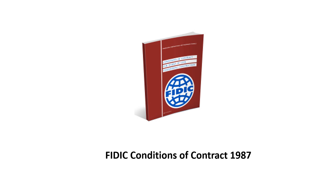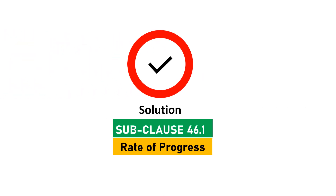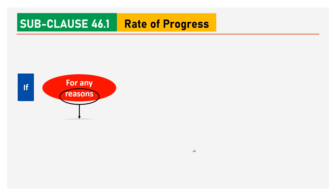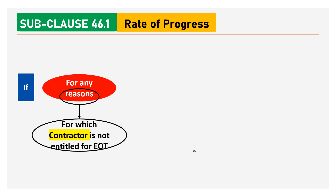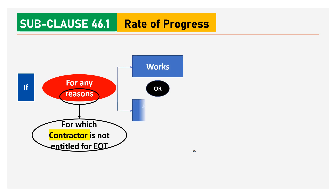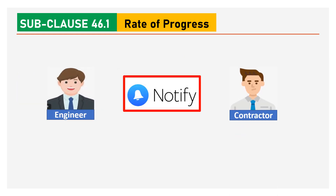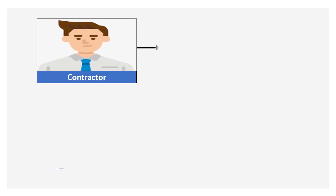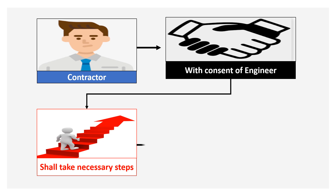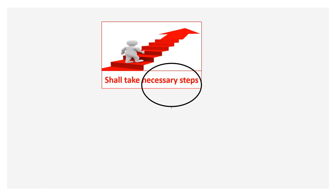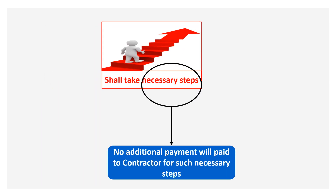Under FIDIC conditions of contract 1987, subclause 46.1 deals with rate of progress. This subclause says that if for any reasons — reasons meaning those for which the contractor is not entitled for EOT — if works or any part thereof are too slow to comply with the time for completion, the engineer shall notify the contractor. The contractor, with the consent of the engineer, shall take necessary steps to expedite the progress of work. No additional payment will be made to the contractor for such necessary steps.